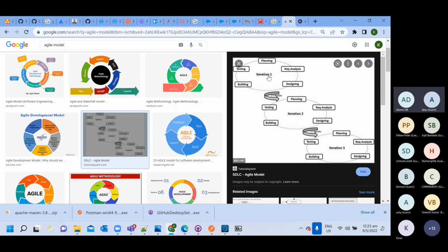The reason can be multiple. Maybe due to developer performance, he hasn't delivered as expected. There may be some dependencies there. There may be some blocker which is not resolved. That's why that particular story is not delivered. So in that case, that story will go in backlog.